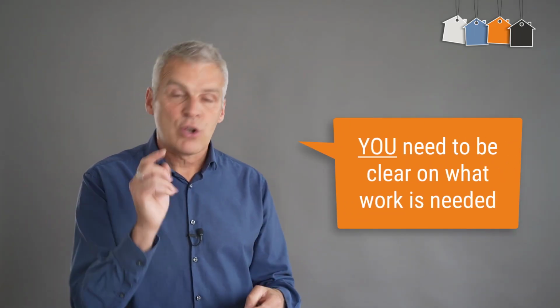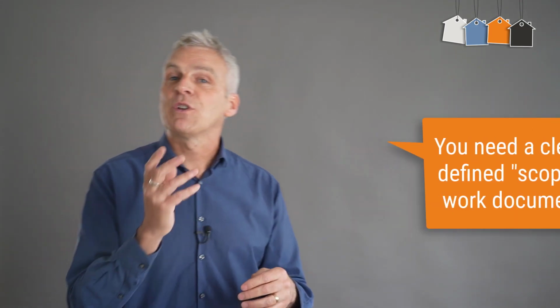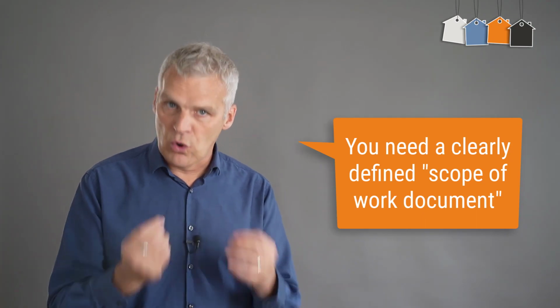With the main job, I think you need to be crystal clear in your own mind on what is actually expected. Often people don't really know, and they leave a lot of it up to interpretation. So in your own mind, you've got to be really clear, and then you've got to present all of that to the contractor in a very clearly defined scope of work document. This is a physical document that literally lays out in detail exactly what you expect from this contractor.